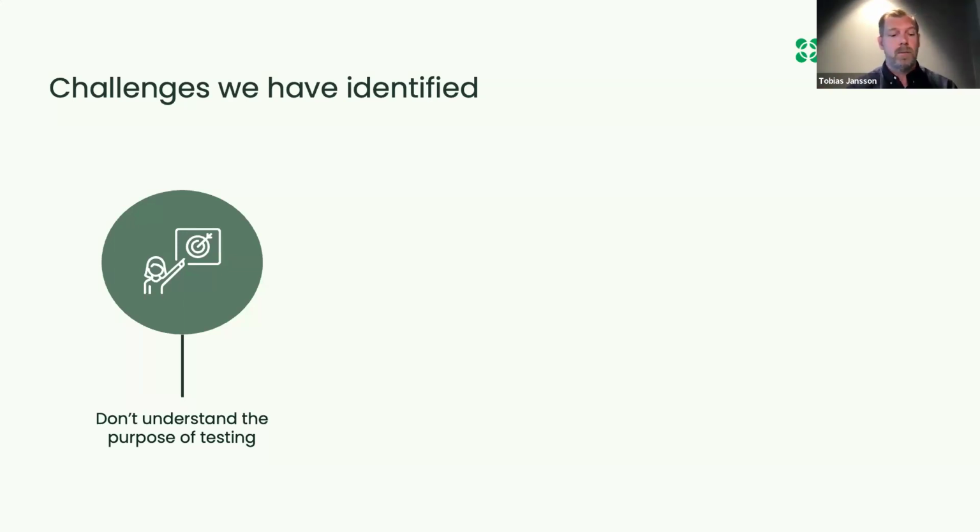This is also two-fold, because the second part is that there is a great misunderstanding that suppliers and vendors will do all the testing for you, or that you're buying a done, ready-to-use product that doesn't need testing. I can guarantee you all that it is the customer's responsibility in the end to test that whatever you have ordered is working in the way you have ordered it.